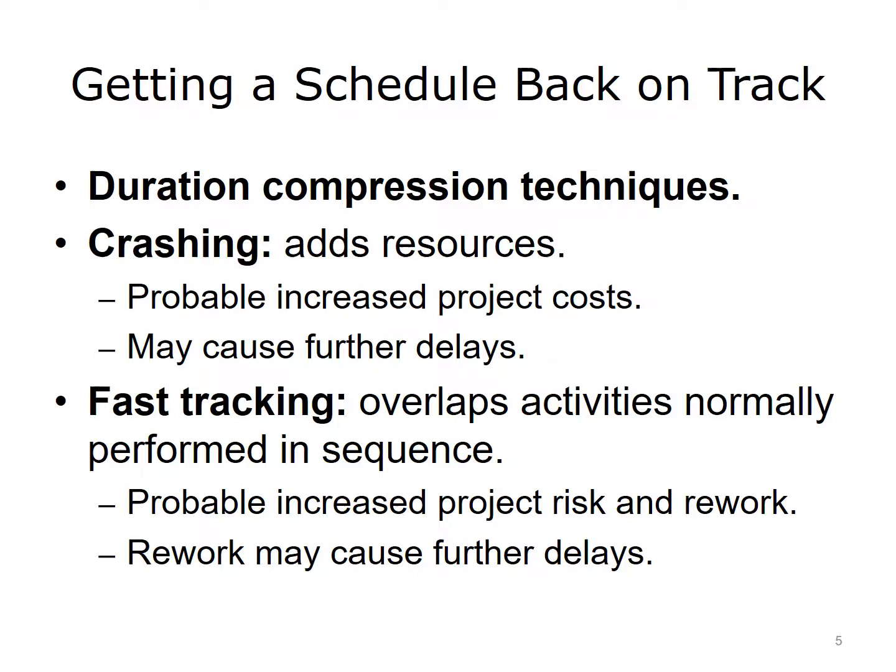Sometimes, despite all your planning, schedules get behind. Two approaches to compressing your project schedule include crashing and fast-tracking. Crashing adds resources to help complete an activity on time. Crashing the schedule will probably result in increased project costs. If you are adding team members, it may even create further delays because current members will have to spend their time bringing the newcomers up to speed.